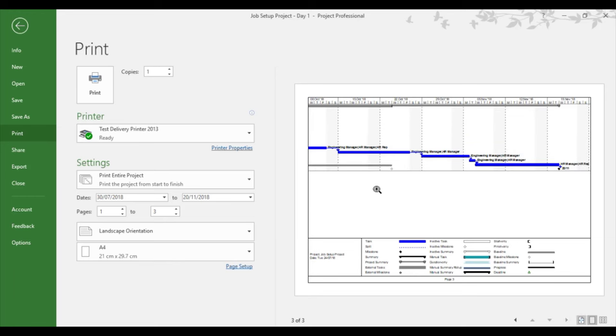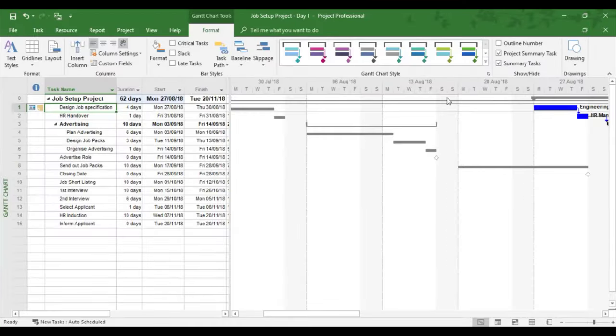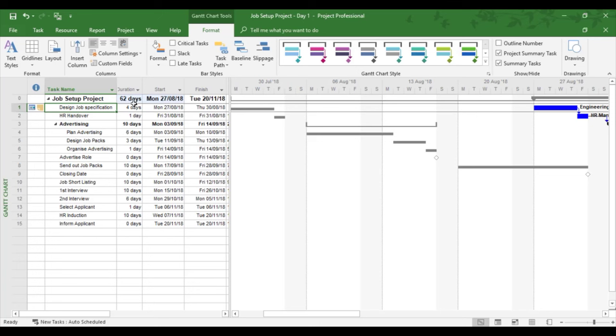Right now, if you print it on A4 as it is, you're going to have to stick the three pages together somehow, roll it up and take it to a meeting. We could get around this by going back into Project, changing the time scales. Duration is 62 days, Project works to a 20-day calendar month, so it's just over three months.